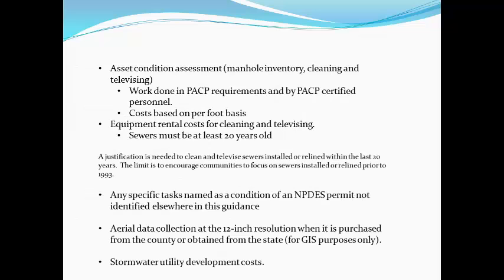Other eligible items are asset condition assessment. Work must be done based upon certain requirements and certified personnel, and the cost would have to be based on a per-foot basis. Also, any sewers that are evaluated must be at least 20 years old. And again, if an applicant chooses to deviate from that 20-year old requirement, they need to submit justification in their application.